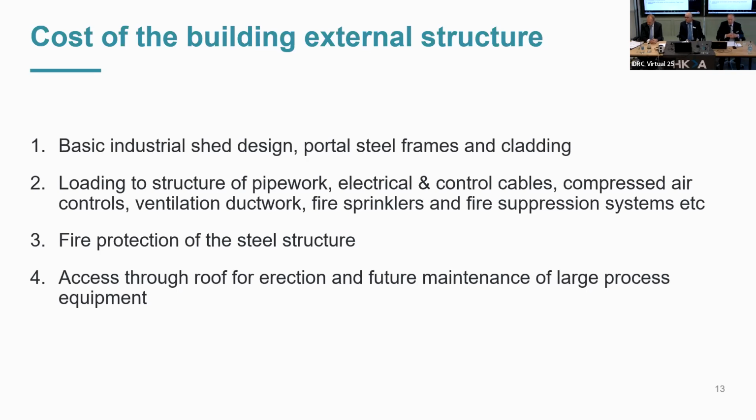Also, I worked on a project where we had major issues to do with the future maintenance of the plant. Some of these large pieces of equipment for biomass, etc., can be installed during the construction, but then there has to be a facility for these items to be removed in the long-term maintenance and upgrading of equipment.